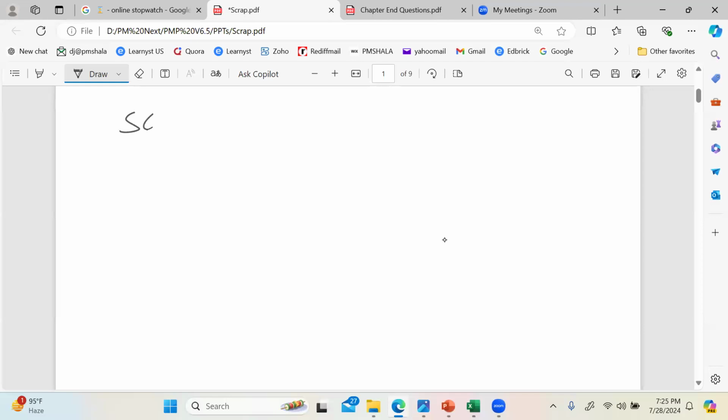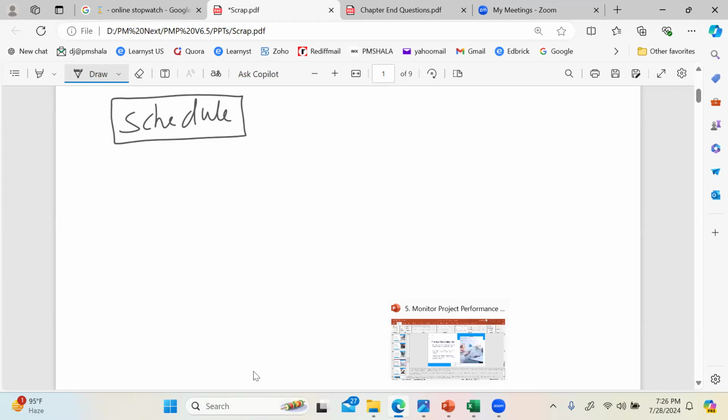Let's say we had a schedule risk. By schedule risk, I'll tell you what exactly is the risk. Due to shortage of resources, my project may not complete on time. Sounds like a risk. We have less resource, so project may not complete on time. That's the risk. Now, what I do is I come up with a response plan for this one.